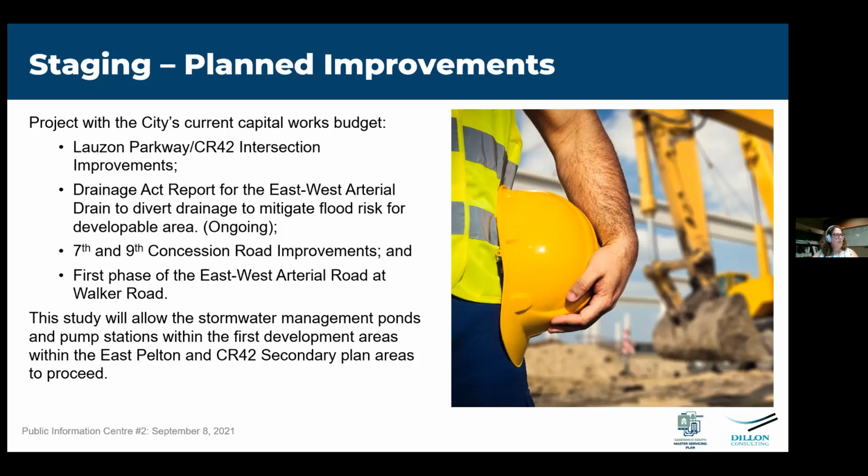Timing of these improvements is related to development. So the capital works budget has been allocated, but exact timing is dependent on immediate development needs. The study will allow stormwater management ponds and pump stations within the first development areas, such as the 2 secondary plan areas, to proceed. And again, that's dependent on development needs within the area.